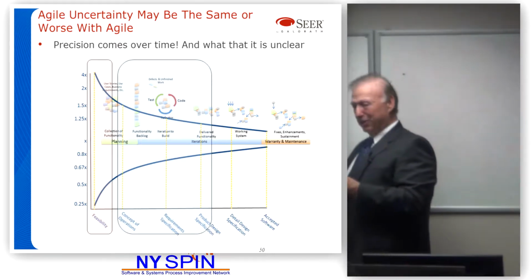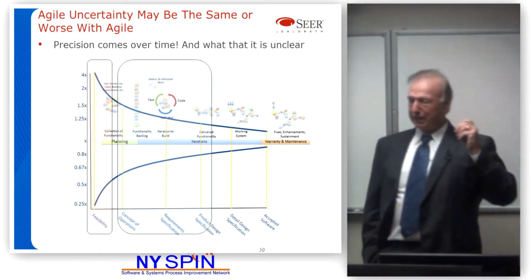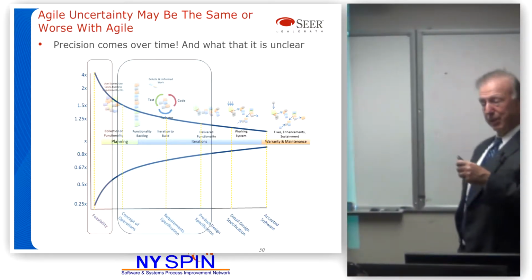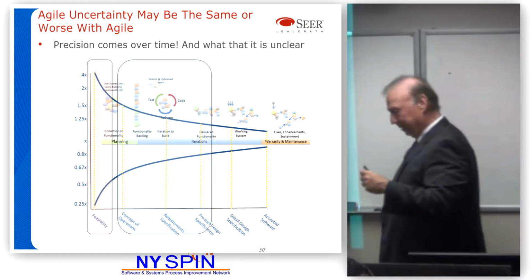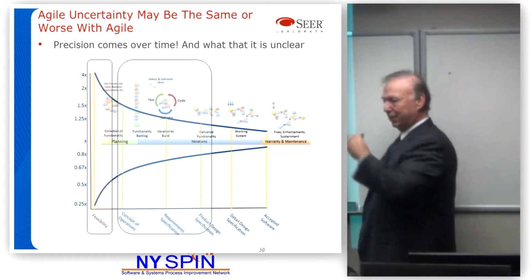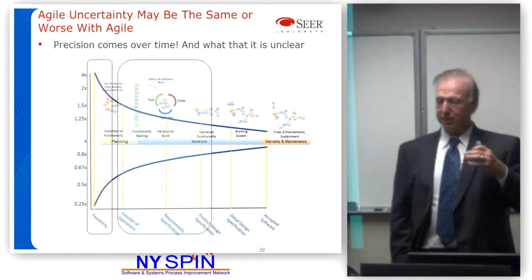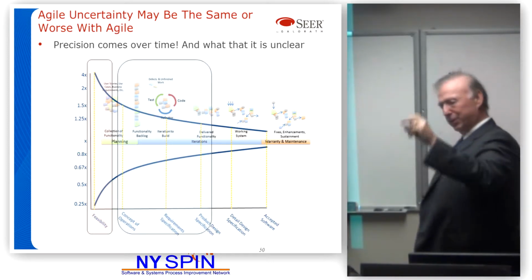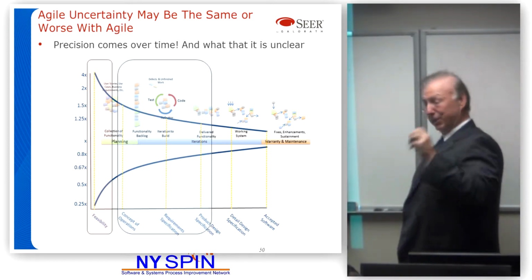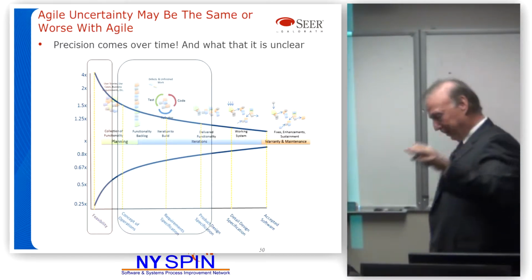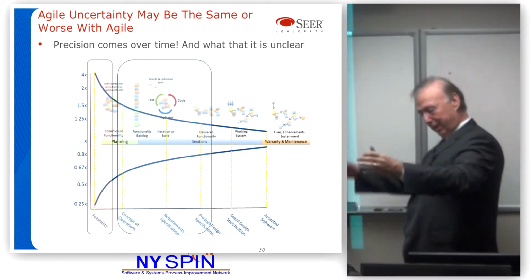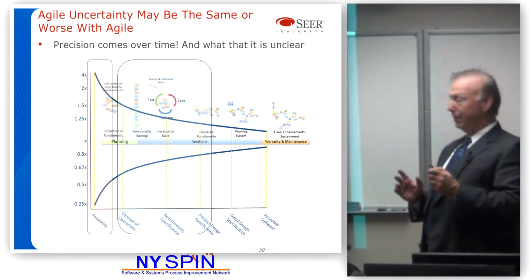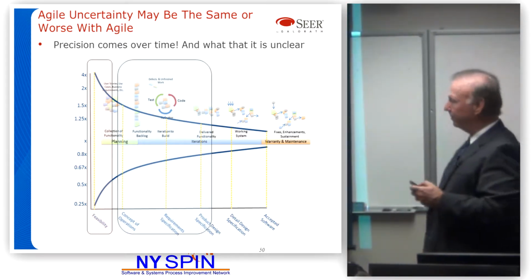It's not cheap. It's not free, and it is completely estimatable. You can figure out the minimum time for an agile job. You can figure out the maximum effort, minimum effort. All the same estimating processes can work for agile systems as well. Agile can be less expensive if you stop before you put in that last 10% of the stuff nobody really needs. Agile can take a lot longer because the way the sprints work can make things actually take longer before you actually have a system you can deploy. It depends on the system, it depends on the problem, it depends on the manager.